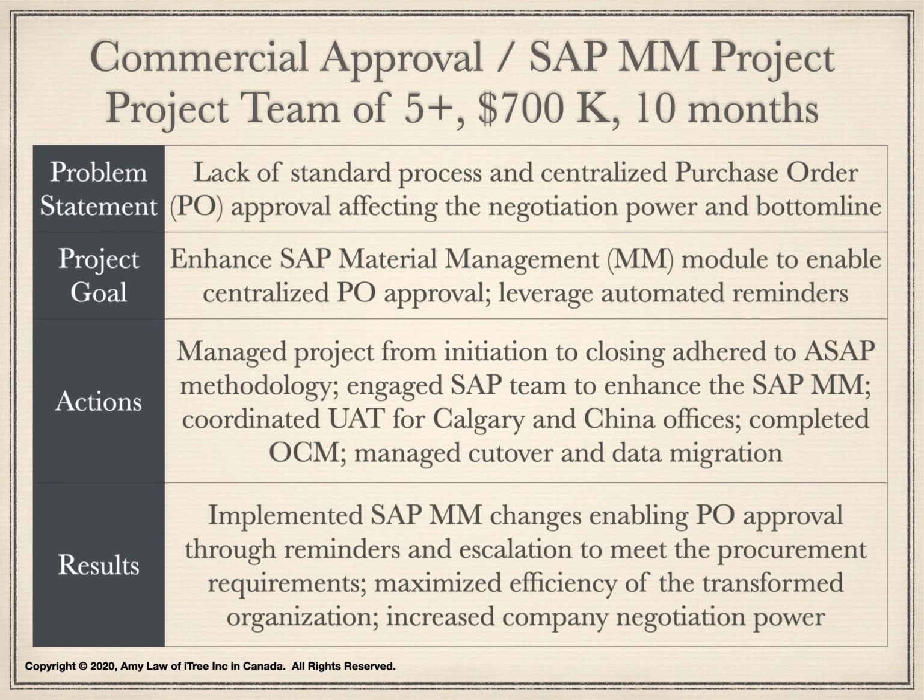And I managed cutover, which was 20 hours of technical deployment and data migration, with validation in Calgary, Alberta, and China. As a result, we successfully implemented SAP material management changes, enabling commercial approvals through reminders and escalation. We helped the procurement transformation program to meet the new business requirements, support the new process, maximize efficiency of the transformed organization, and increase the negotiation power of the organization, leading to a cost saving.